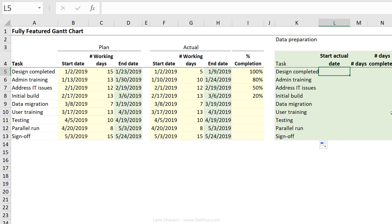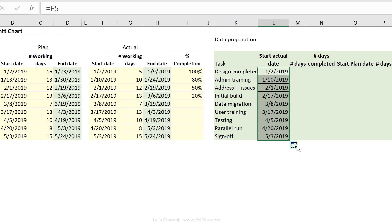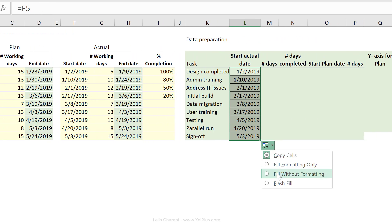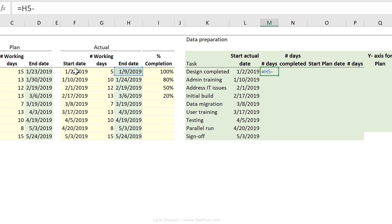For the start actual date, that's again a direct reference to my start date under actual. Let's push this down and fill with that formatting. Number of days. That's the difference between my end date and the start date. Let's also send this down.